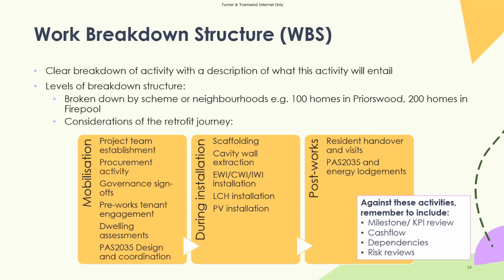Then you've got things like the pre-works, tenant engagement. So when are you sending out specific letters? When are you doing some door knocking? When are you having specific events happening for those neighborhoods? Then you've got things like the dwelling assessments. So before actually doing any installation of works, you might need specific dwelling assessments. So it could be PAS 2035. It could be additional detailed assessments like boroscoping. And then you also need to start setting up your design and coordination for those properties as well.